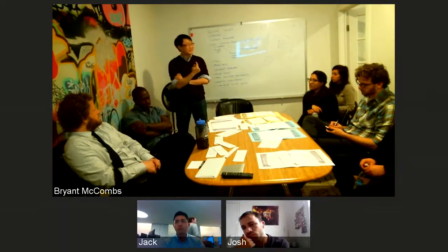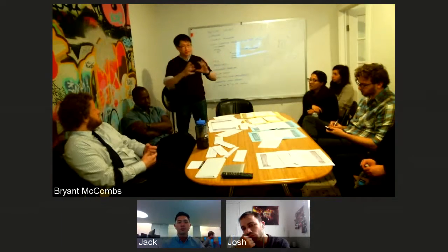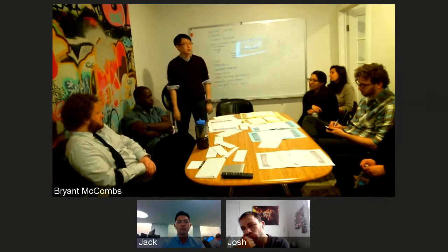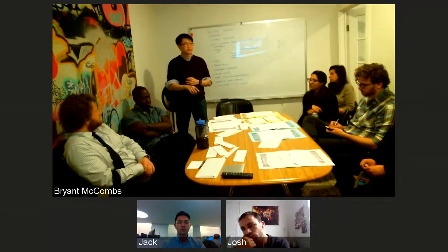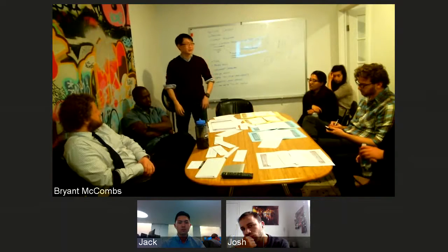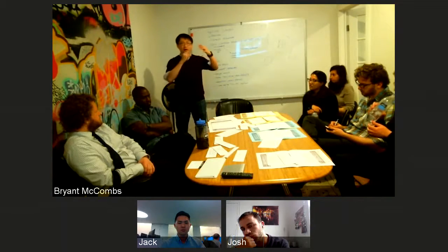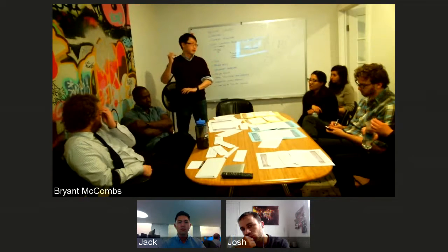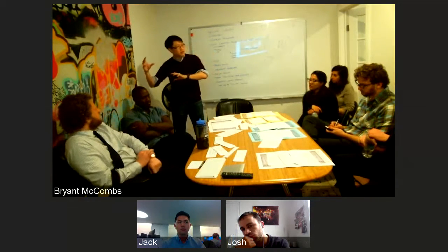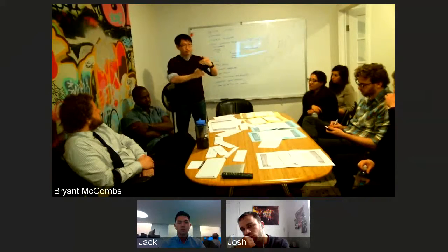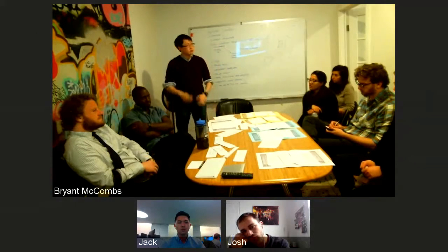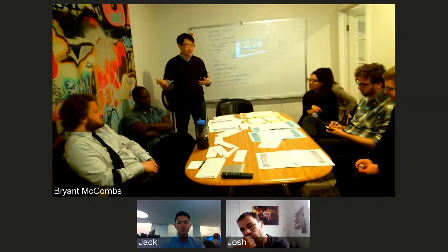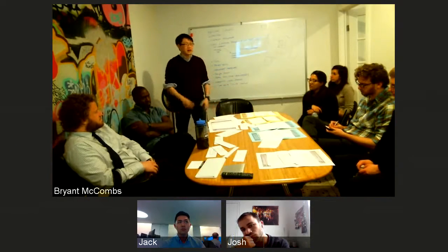If it really is becoming way too big to contain on a single card, you look for logical places to cut them off. Error validation and things like that sometimes are where it gets cut off. It's like, okay, here are a bunch of things that can't be tracked on this card, which is already 32 hours. Let's write a couple of 8-hour cards and shrink this one a little bit. Or maybe it doesn't shrink. Maybe you're just finding new features that need to go on for this to completely make sense.